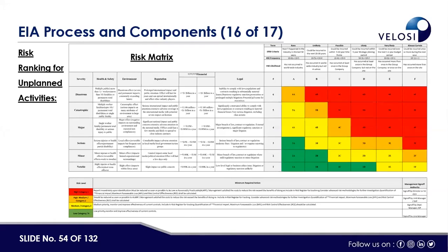For example, if I talk about UAE, there is a rule that before commencing EIA, we have to submit one application to the regulatory authority, and then the regulatory authority will determine, on the basis of the information, the project nature and the location as well, whether EIA is required or not. So on that basis, the regulatory authority can determine whether EIA is required or not.